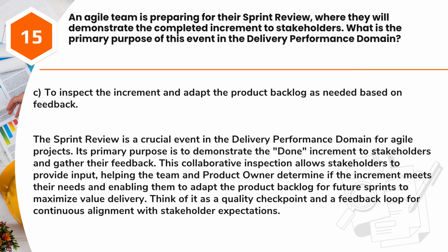Answer: C. To inspect the increment and adapt the product backlog as needed based on feedback. The sprint review is a crucial event in the delivery performance domain for Agile projects. Its primary purpose is to demonstrate the done increment to stakeholders and gather their feedback.